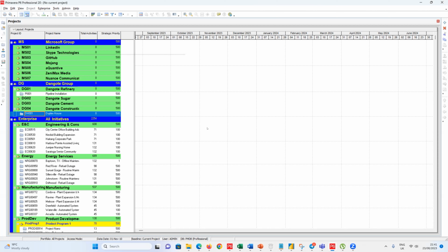For you to be able to see it, because the project is what you want to break down, and the WBS will sit inside the project. So for you to get something inside something, you have to open that thing. So for you to get that WBS into it, you have to open the project. And I will tell you how to open a project. Two ways to do that.